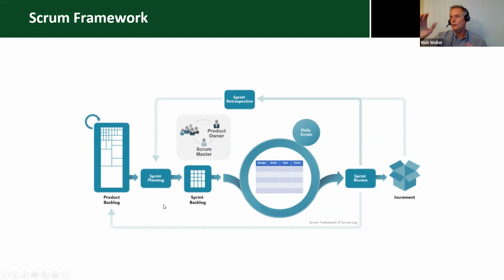Because these items that we could do better are basically introducing change into our system, and this is change for the better because we're trying to improve, but we don't want to introduce too much change into the next sprint. We just want to take them in smaller digestible chunks, and so we pull forward into our next sprint. We plan to make improvements in one, two, or maybe three different areas depending on what those changes are.